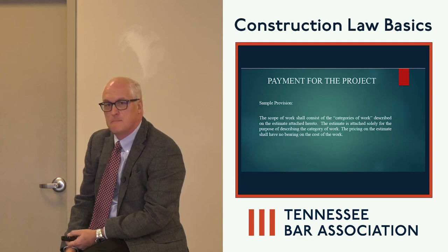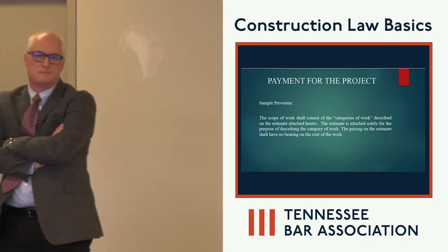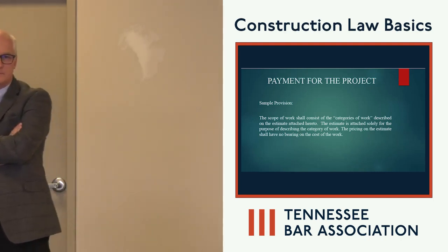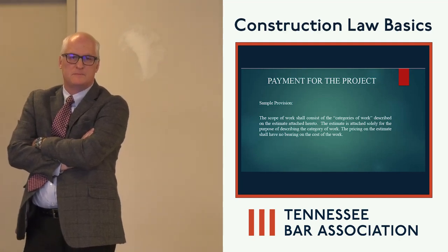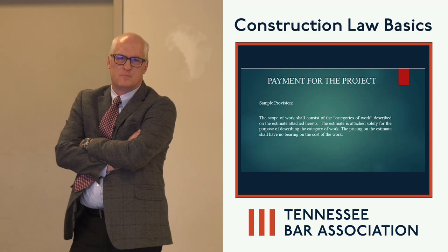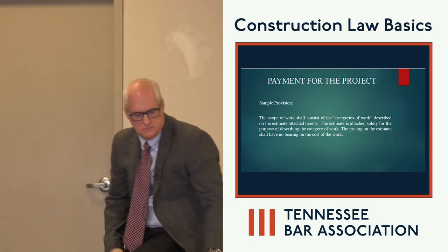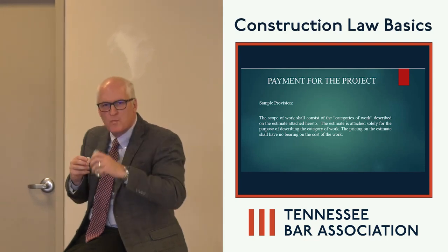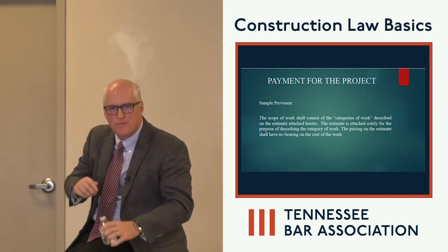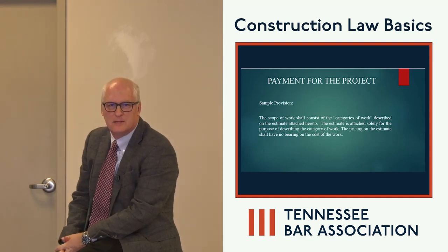Well, in support of your view with that provision, there's at least one Tennessee case that I have cited, probably more than I should, but the quote in the case is, an estimate is just that, an estimate. That's a great quote, because when I have contractor clients, I always tell them, don't ever say this is the budget, say it's an estimate, because at least you've got the argument, hey, that was our best guess when we put this together.